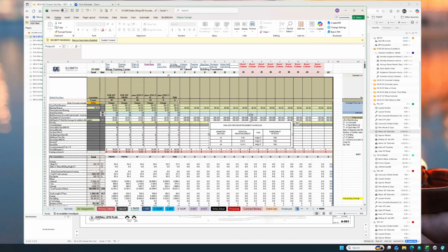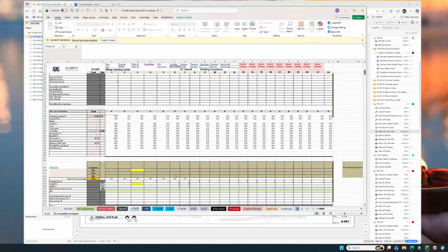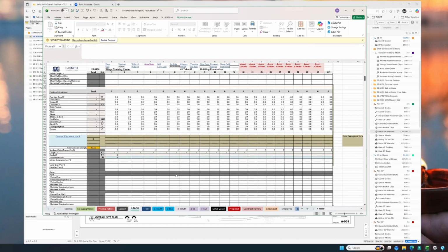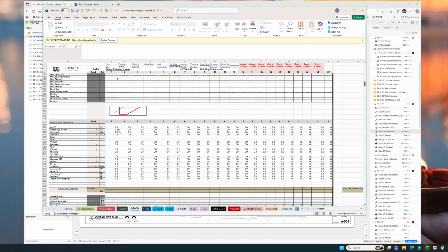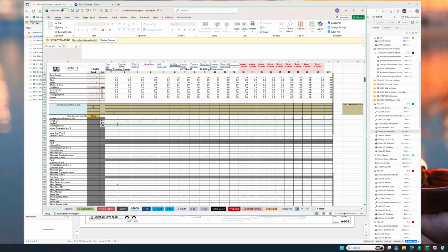So I was just going to do a template for each size. If we're doing conceptual estimating, just 24, 36, they've all got the typical rebar. And then here, I clip off and just put my schedule in here so I don't have to go back and forth. I have these all built out for footers, high walls and low walls. I bring my rough quantities in here in the brown, and I look them up and just answer the question. So I make myself go through and answer.